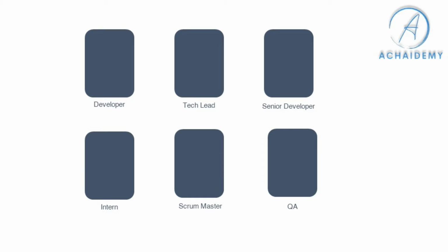So instead of leaning towards a developer effort or a QA effort, planning poker helps everybody give their effort and then agree on a particular effort. So as you see here, once the product owner explains the story and everybody understands all the scenarios and there's clarity, that's when everybody will give their effort.